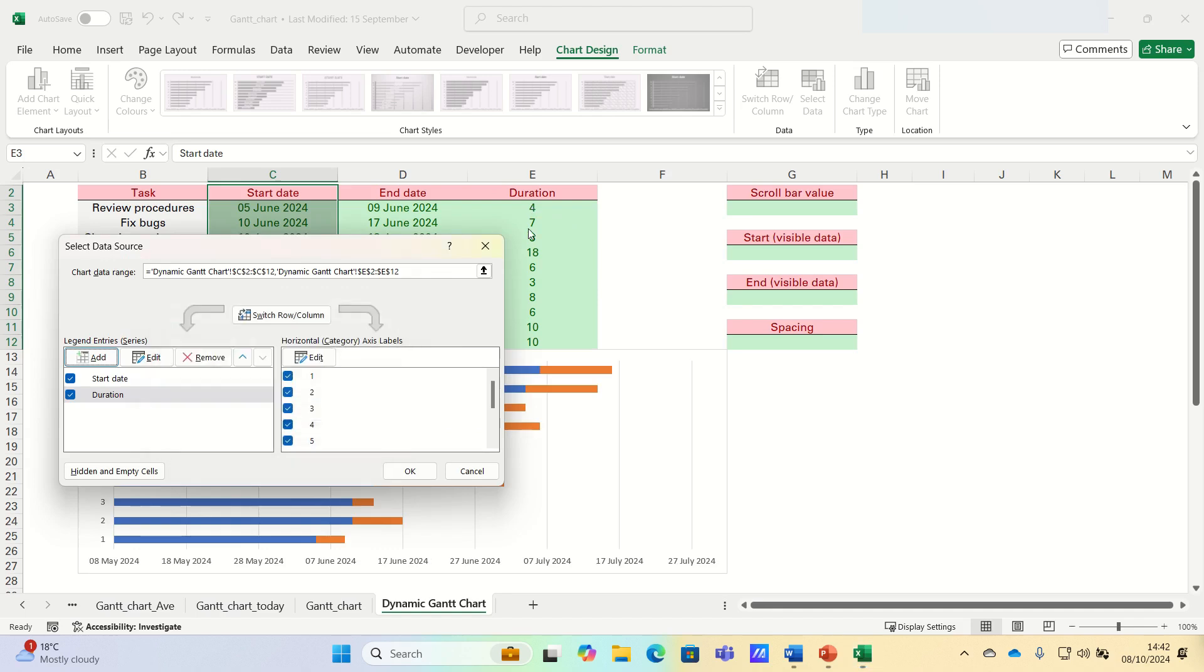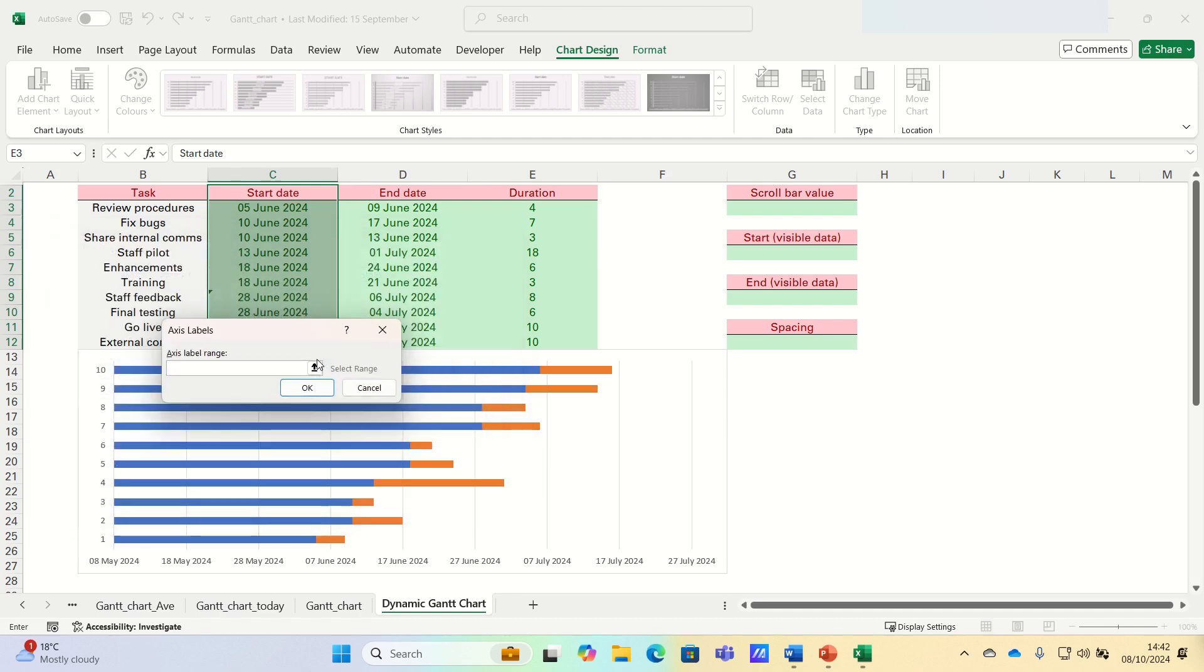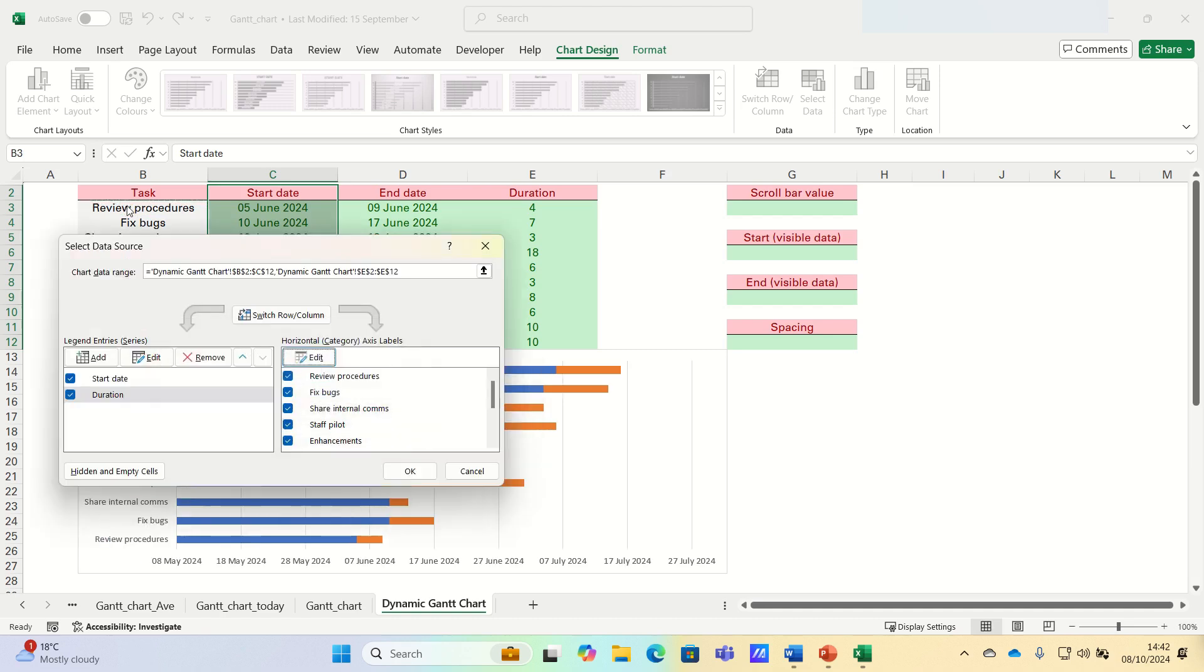And next we're going to add our project tasks to the y-axis of the chart. To do this, click edit under horizontal axis labels. Once the axis label opens, select your project tasks and then click OK.